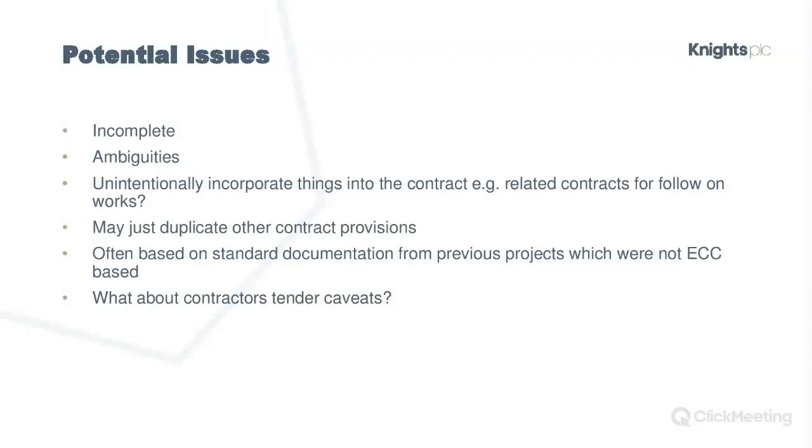So, my advice to contractors and subcontractors is interrogate these documents. If there are ambiguities, raise them at tender stage. Typically, ambiguities are dealt with in a way that is beneficial to the contractor, subcontractor, whoever's doing the work.